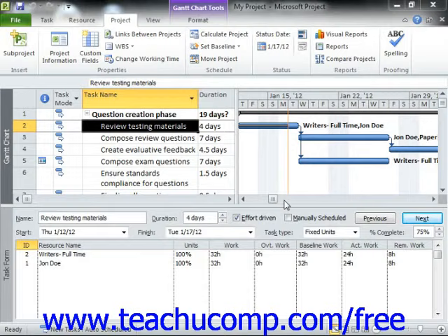You will often need to update the work performed on individual tasks in a project file. Often tasks with a long duration will need to have their completion progress measured and marked individually as the work is completed over time. When entering progress made on a selected task in a project file, you can either individually mark the percentage complete or the actual work values completed.